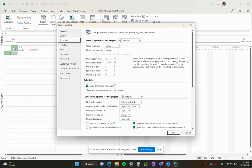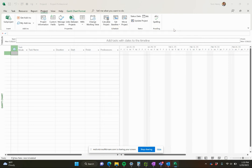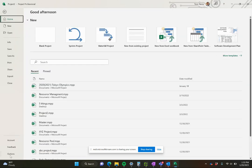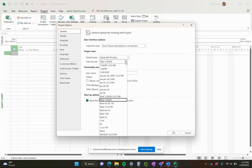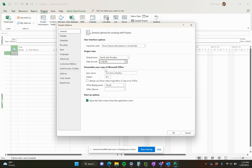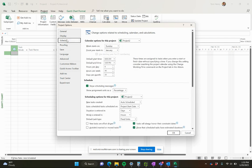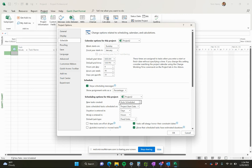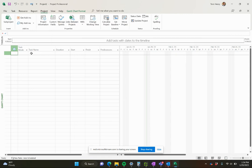In here, there are some other project options as well. You can actually access this menu by clicking file options down the bottom here. This is where we can set up the project in more detail. I don't do an awful lot in here. You can come in here and change the date format. I do come in here and make that just that lowest denominator there just to save myself some real estate. You can change the display, change calendars, change the currency - that's an important one. You can change how schedules are set up. I always change this new task created to be auto-scheduled by default for all my projects and for all my new projects. You can toggle those here. I'm going to press OK at this point, but that will be enough to get you going.